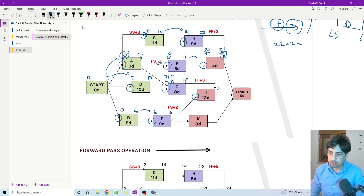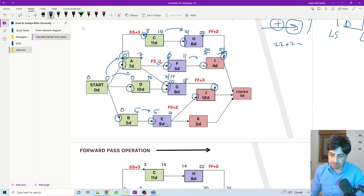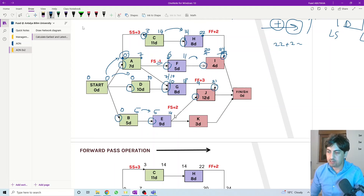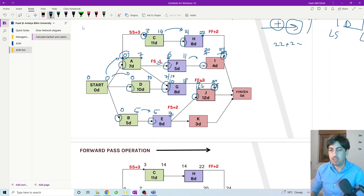For activity J we have two options. The first is a finish-to-finish plus three from activity G: eighteen plus three equals twenty-one, and twenty-one minus twelve equals nine. The second is finish-to-start plus two from activity E: fourteen plus two equals sixteen, and sixteen plus twelve equals twenty-eight. Comparing the options — twenty-eight versus twenty-one — we select the highest, which is sixteen and twenty-eight.